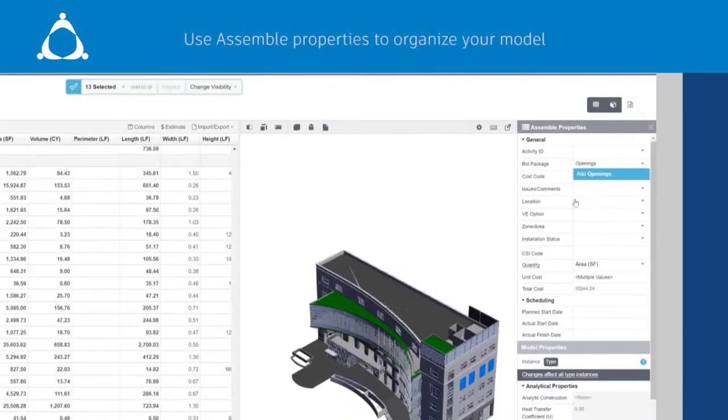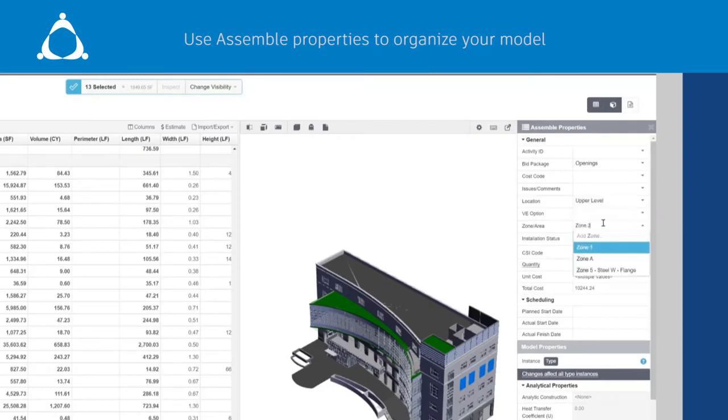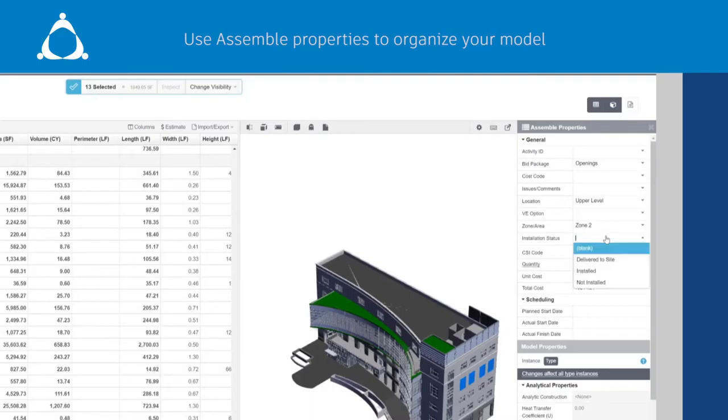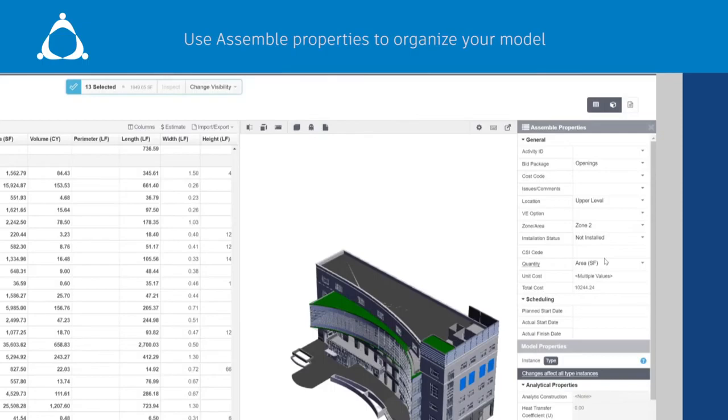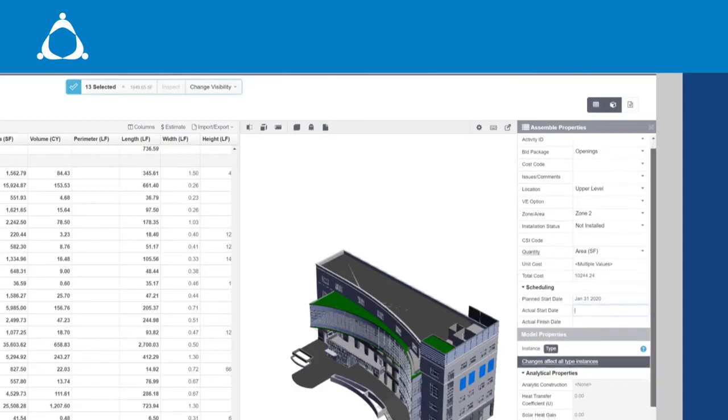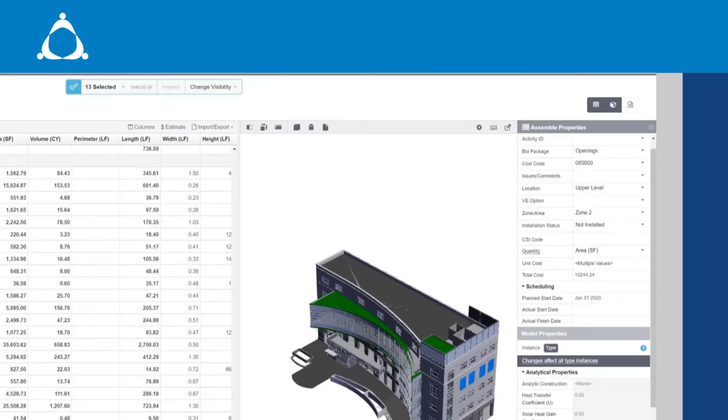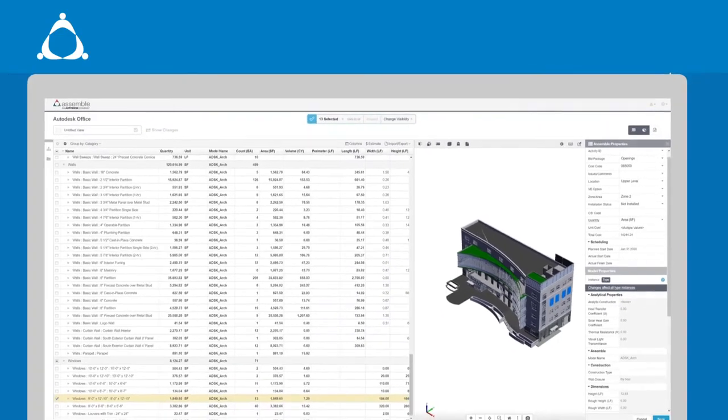Assemble properties facilitate model conditioning and data exchange for user-defined properties. These properties are great because we don't need to create parameters in Revit. It's an easy way to condition a model with information outside of the design model so that you can organize a model in the way you want to see it. You can add information such as activity ID, bid package, cost code, location, VE option, zone area, installation status, and more.